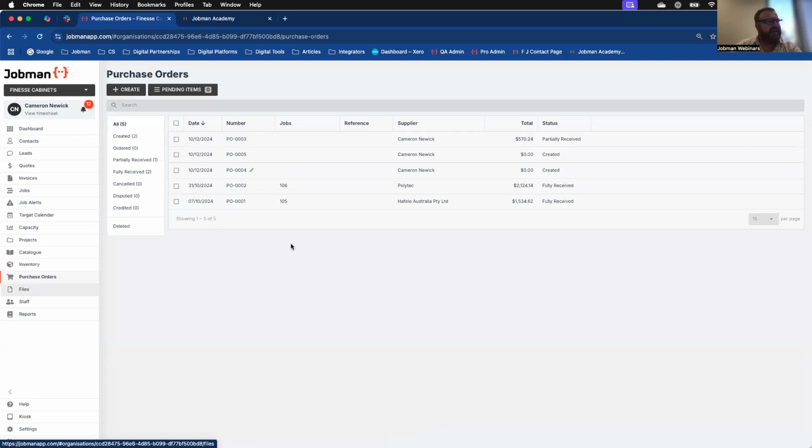So again, adding setting or pending items to already created purchase orders. The hot tip I want to give you here is just to make sure that the purchase order is in a status that can be modified. So for example, if a purchase order has already been placed and partially or fully received, you won't be able to take advantage of this information simply because it's already past the point at which you could be creating an order rule. Now, I know that sounds a little bit redundant to say, but it is worth mentioning.